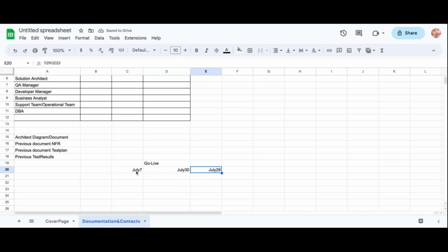So in order to do that, you need to understand from the client, development, stakeholder, everyone, when they are expecting to complete. Okay, they are giving July 7th only for the stable application, and they are expecting to complete July 9. Definitely it's not possible, right? So you need to understand when they are expecting, and based on NFR you will decide.